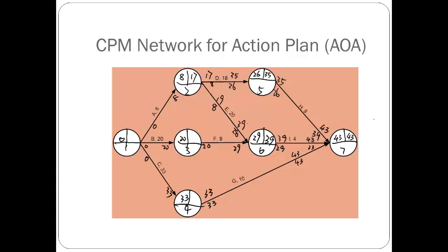You have two events. Oh, sorry, actually, I was wrong putting that there. Okay, so you have two activities going in. The latest finish, you need to take which one? This is 17. Yeah, you take the smallest. So that one should be 17 here. Okay.